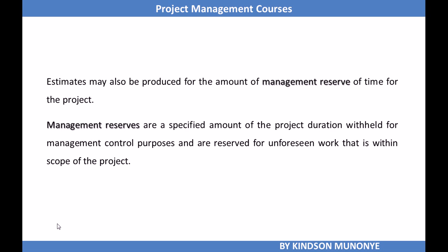Now we also have management reserve. Okay, management reserve is different from contingency reserve. Management reserve is not part of the schedule baseline, and is a specified amount of the project duration held for management control purposes and reserved for unforeseen work that is within the scope of the project.